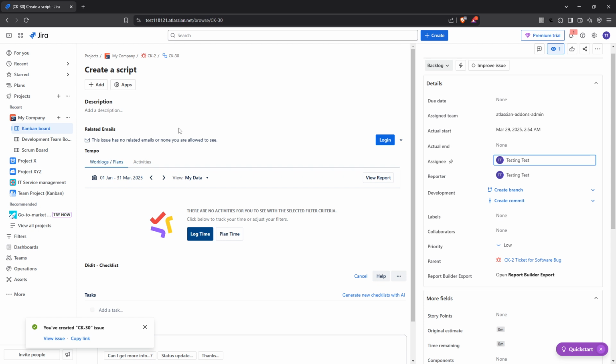Finally, consider leveraging Jira automation to streamline your workflow further. You can configure Jira to auto-close parent issues once all associated subtasks are completed. This can save you time and reduce the manual overhead of managing tasks, letting you focus more on things that need direct attention. By incorporating these strategies and tips, you will be able to utilize Jira's subtasks effectively, leading to a smoother, more organized workflow, enhancing both